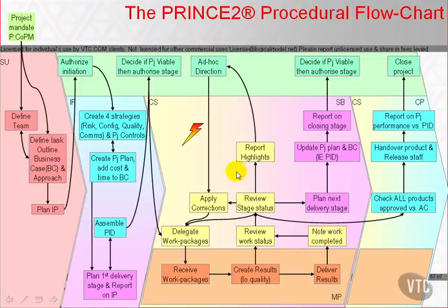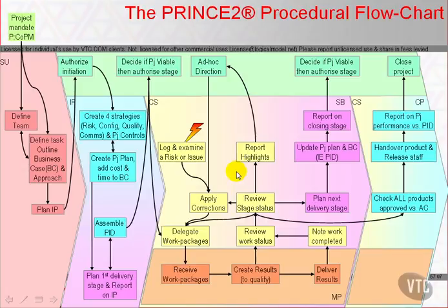When a risk or issue arises, it is logged and examined. If it is inside the project manager's authority, corrective actions are taken. If it is outside of the project manager's remit, an exception report using Appendix A10 is raised to the project board to consider.